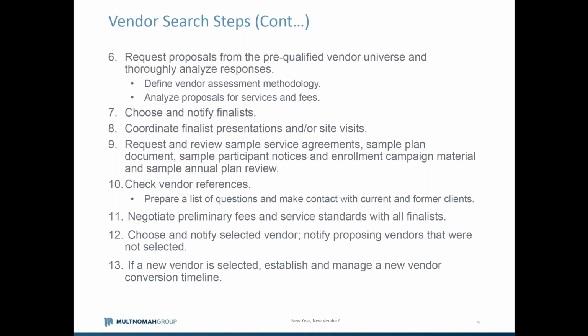And then once the finalist presentations are done, requesting vendor references and checking those references at that stage is important. Again, that's another area where I think it makes sense to have a lot of structure and have very specific questions that you want to ask of those vendors, and also ask the vendors for both current clients as well as former clients to speak with.